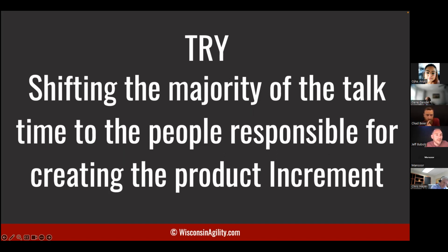So how might we do this? Try asking the question to the developers next time. You need to start this thing right now. Let's just pretend we're going to start this thing today. What do you need to know? Well, I would need to know this and that. Well, okay, I'll give you that information. Now, what else do you need to know? Well, this or that. Okay, you could start. Yeah, I guess I could start working on that part and this part, and we'd figure it out. Okay, good. That's enough, right? So those might be some prompts to help you get to that point of, we are ready. We have enough information to start this thing. Just pretend it was the most important thing. We're going to pull it in right now. What would we need to know?